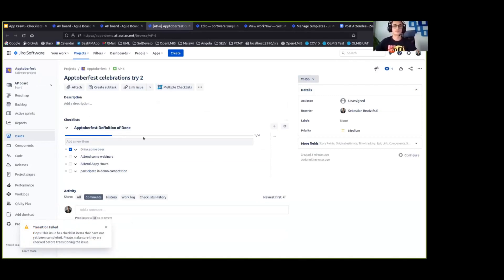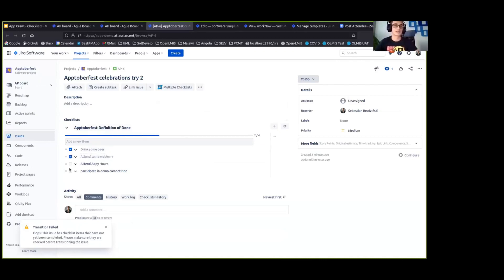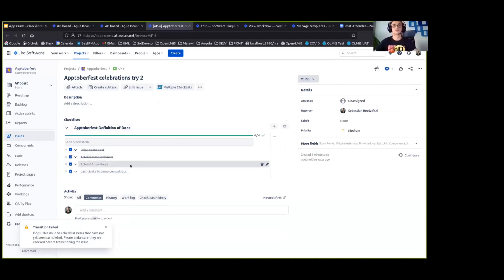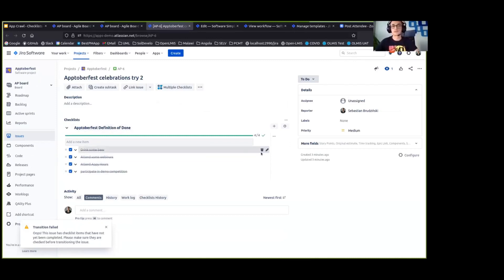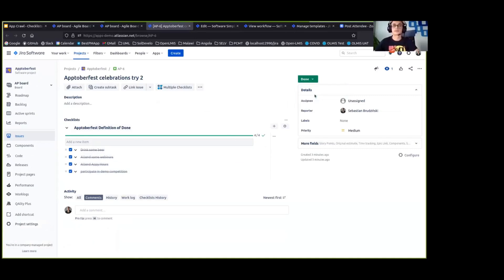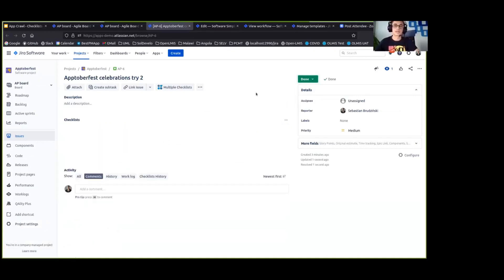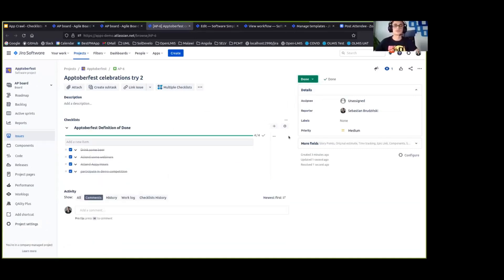So before we move that issue to done, we have to select, check all of the items on the Oktoberfest definition of done. And now that our checklist is completed, we can attempt to move the issue again. And now it has worked perfectly fine because our definition of done is completed.